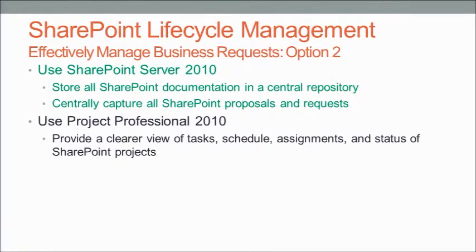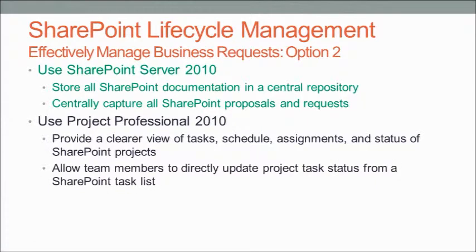We can use, on an as-needed basis, the Project Professional client. And the beauty of the Project Professional client, and some of you may use it, some of you may not, is that with Project Professional, you can sync your projects onto SharePoint, and that's SharePoint Standard or SharePoint Enterprise. And that means that a professional project planner can do all the things that he wants to do, but he can share it with the team in the SharePoint environment. They don't have to have Project installed. And it gives them the ability to do some simple updating straight into SharePoint.